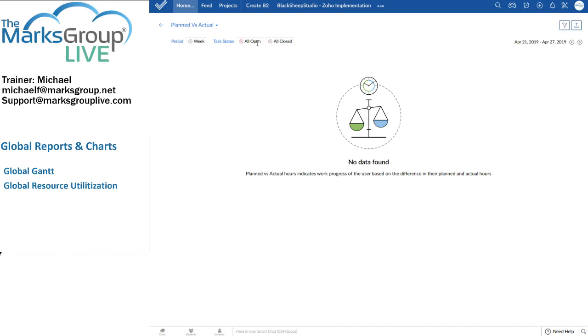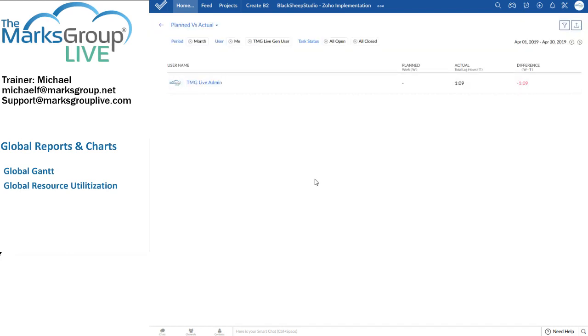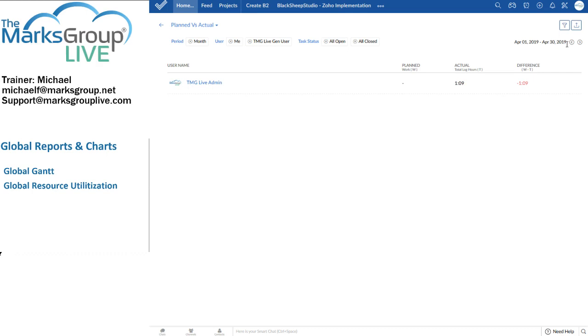In the planned versus actual, I can see the difference between how much work was planned within a given time period. And again, we have the chevrons to go left and right. It means backwards and forwards in time. The difference between how much work was planned and how much work was actually logged. And really, realistically, what this means is you have to be on top of your project team members to report their work accurately or else this chart becomes meaningless.